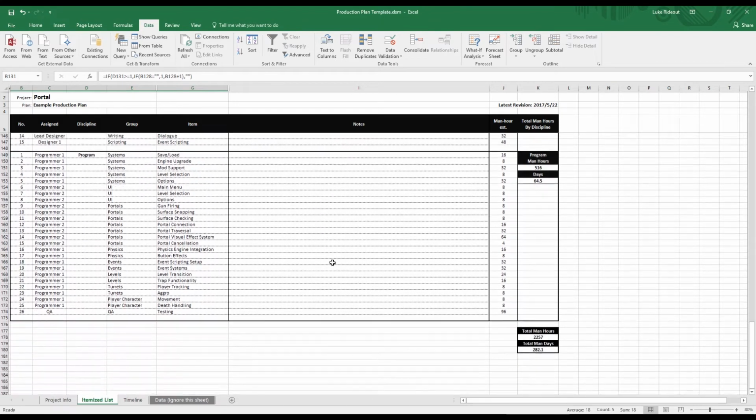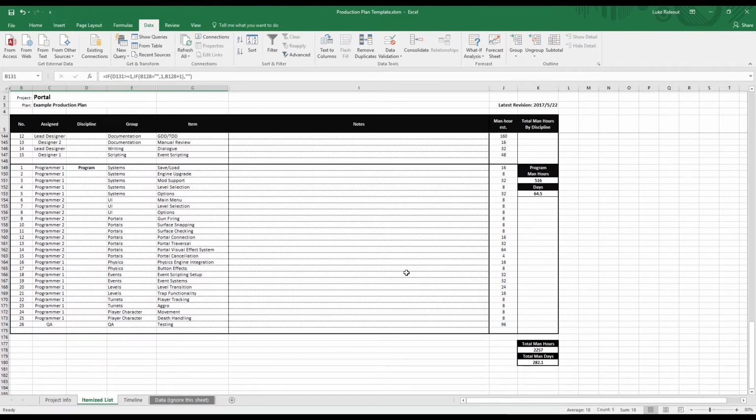After we've got our feature list prepared, the head of each department, or project leads in each discipline depending on the studio, would work together with the producer to assign man-day values to each task. In some cases, this comes with a fair bit of negotiating and at times even discussion back together with design on cutting or revision of mechanics. Additionally, the tasks will be at least tentatively assigned to members of the team so that we can ascertain how much real time will ultimately be needed for each group.